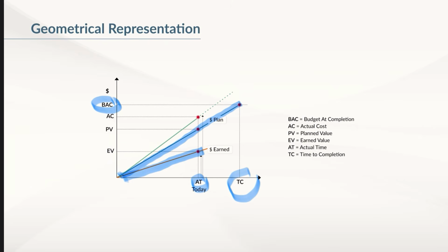Accounting also informs you of the total project expenses as of today. This is called the actual cost, or AC for short. You also add the AC point on the graph. In the slide, the trace of the AC is shown as the green line.